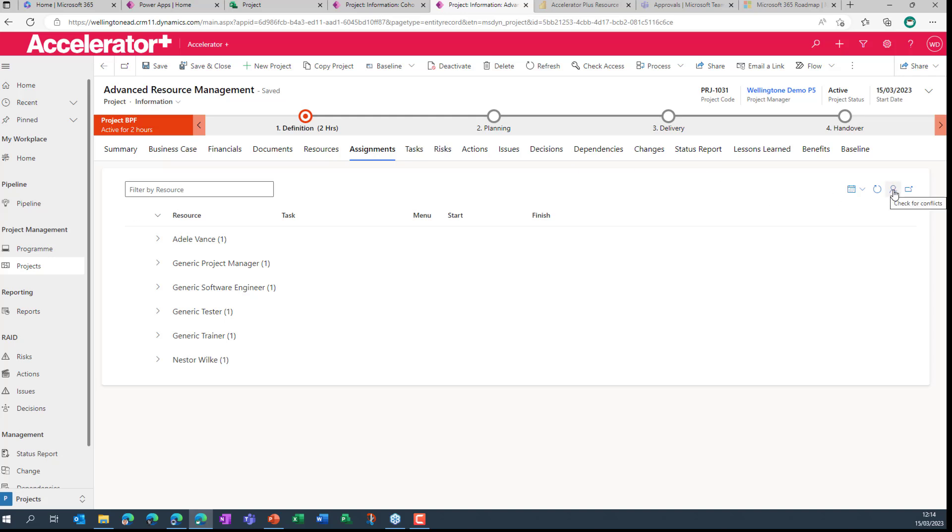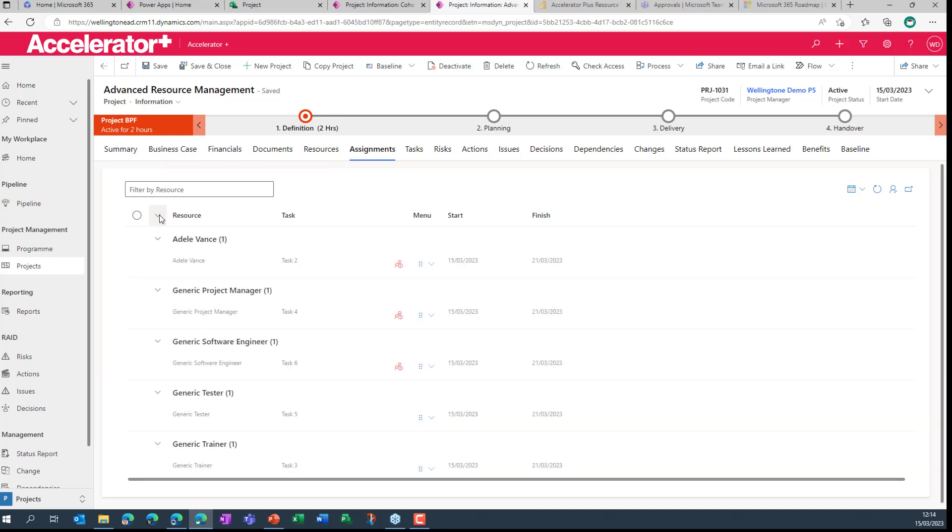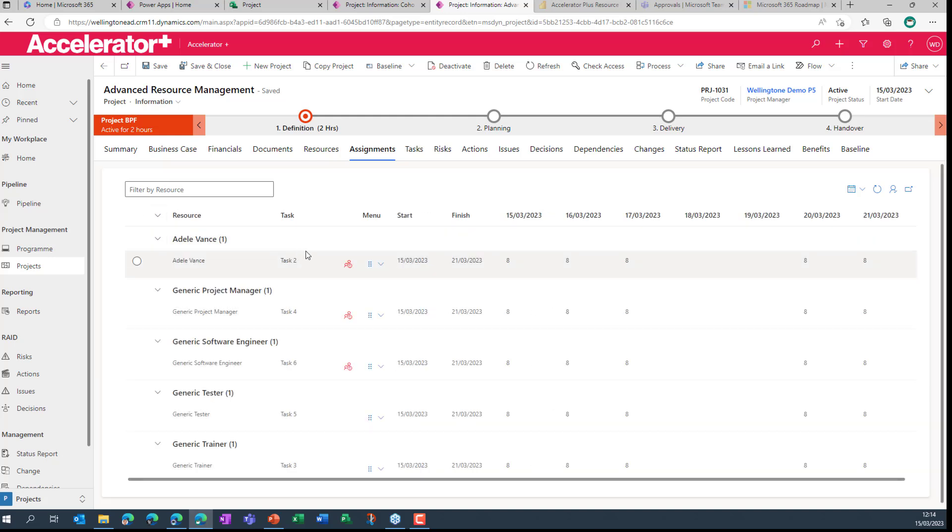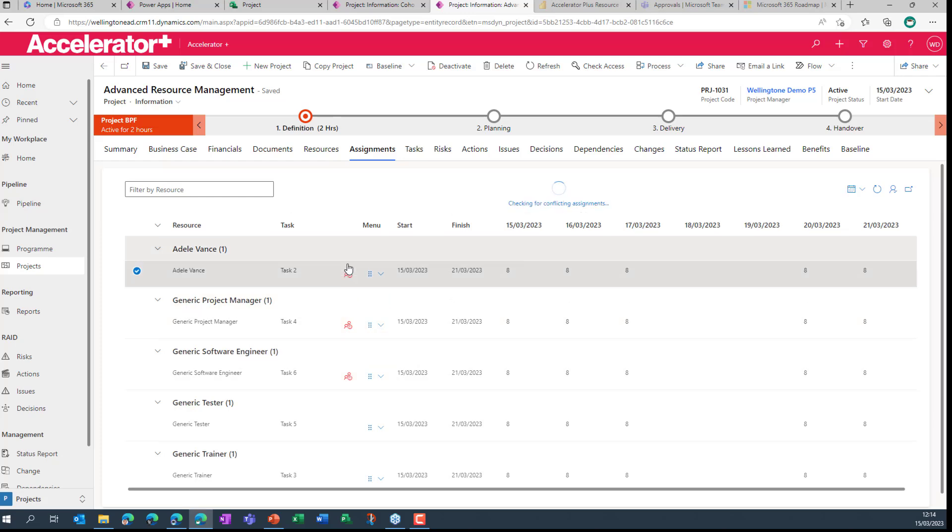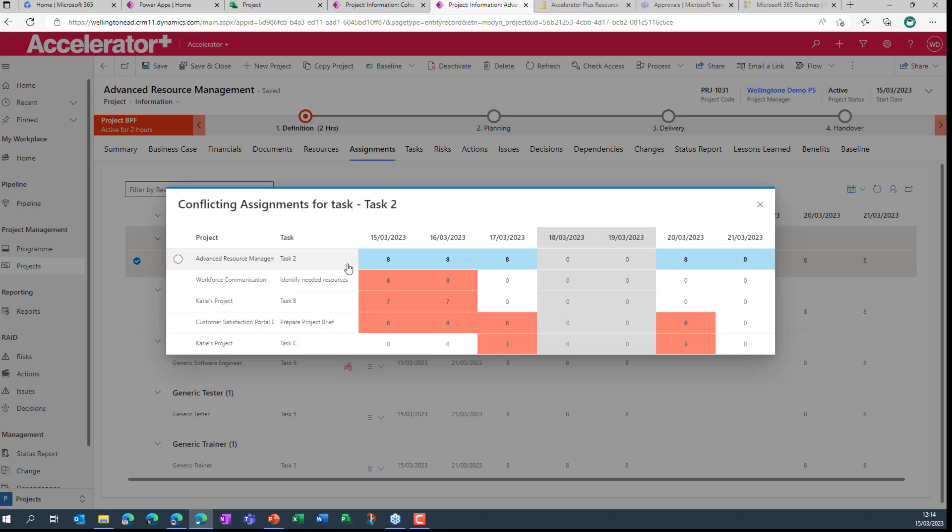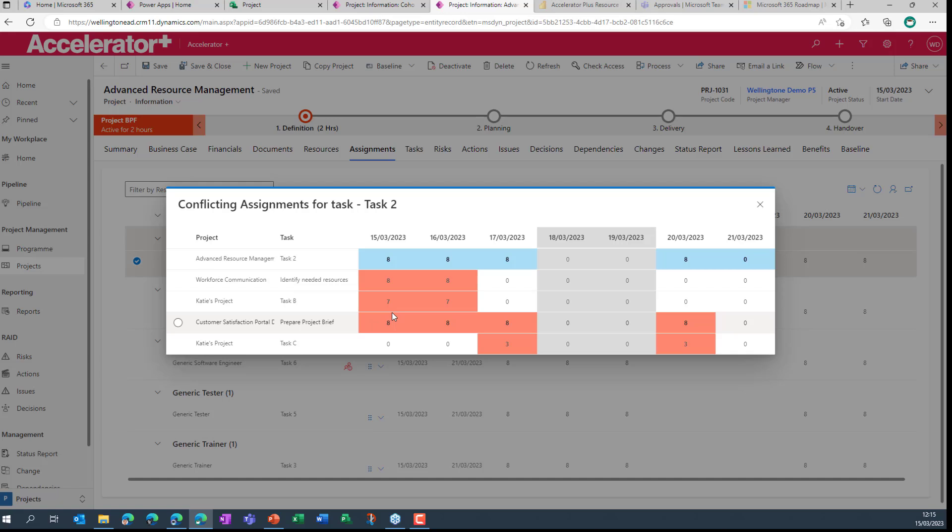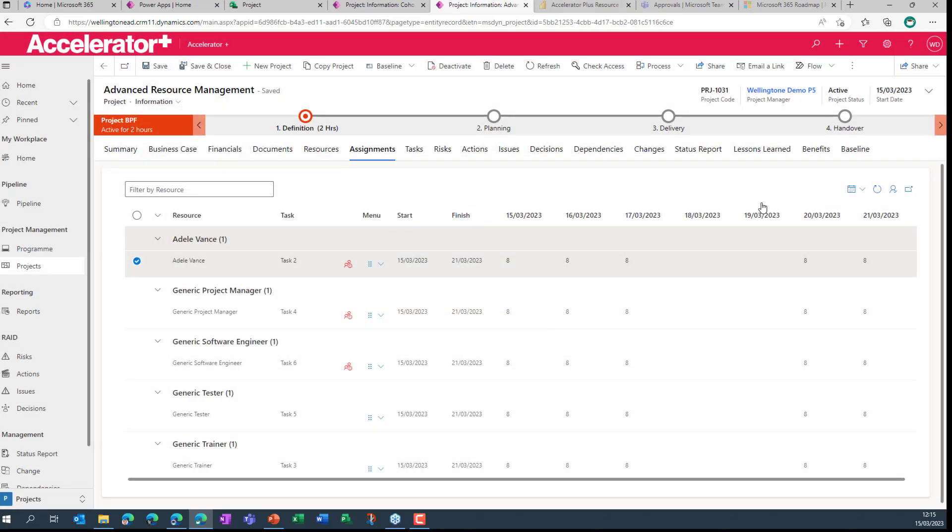A couple of additional things that I'll highlight now. First of all, we can also check for conflicts by pressing that button there. Going back, let's expand this out. And we can see straight away some red indicators popping up indicating possible conflicts. So let's click on that. And we can see that that resource, which I think was actually Adele, she's pretty much maxed out. So we've got her assigned to this task in this project, but look at all of the other work assignments that she's got in her diary. Now, realistically, this should not occur if people are following the process and checking people's availability before they start allocating resources.